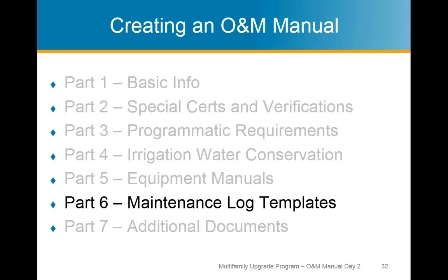And so the question about the TCAC requirement, if the question was, is there any O&M manual requirement when doing TCAC rehabilitation projects, the general answer is there is a requirement if the points have been selected for sustainable building management practices, and you can find sustainable building management practices in the regs, and that's something that we can send out afterwards if you'd like, and that tells you what's expected. So commissioning is the larger requirement, so the much heftier requirement, but there is an O&M requirement, but it is pretty basic.